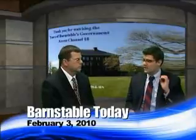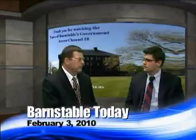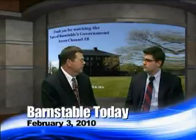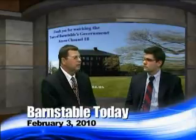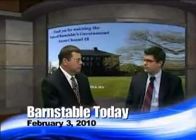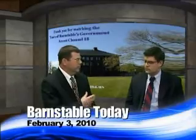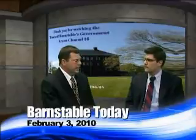Now, moving on to what's ahead here, there's still a little bit of process left to go to make the decision official for this redesign, right? There is. There are a few public informational meetings or public hearings coming forward. One will be at the Joint Transportation Committee earlier this month on February 12th. And then next will be the Metropolitan Planning Organization. Again, those are public hearings. The public is welcome to hear your input, your feedback. We'll also be putting out our draft report, hopefully March 1st, and we'll be soliciting public input on that also.